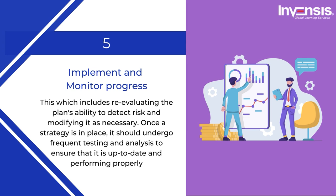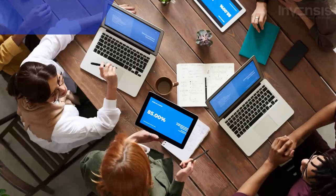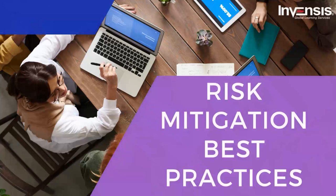Fifth is to implement and monitor progress, which includes reevaluating the plan's ability to detect risk and modifying it as necessary. In business continuity planning, plan testing is essential. Once a strategy is in place, it should undergo frequent testing and analysis to ensure it is up to date and performing properly, accounting for any shifts in risk and altering priorities.